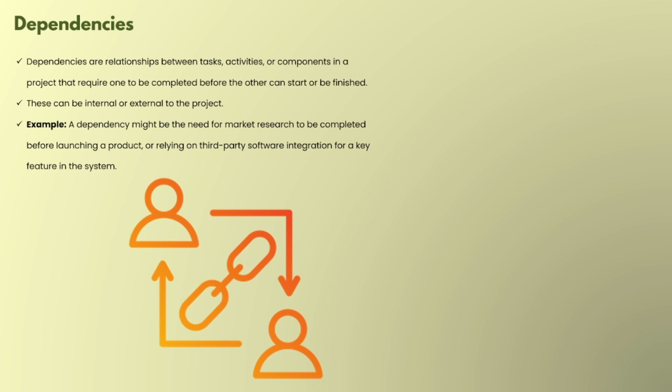Okay, this means it is within the organization, we are talking about a department in the organization. While waiting for approval from a government body is external, because the government body is not our organization. In one organization there are plenty of departments, but we call that an internal thing. And if we are waiting for approval from a government body, then obviously it is an external dependency. So I hope now you got the idea. We will see another example.